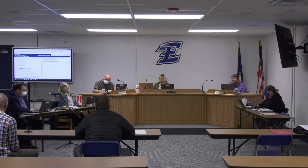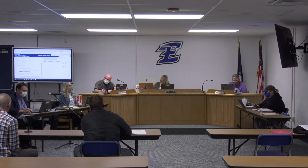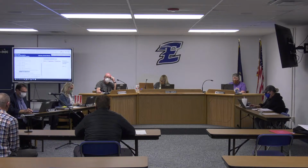Okay, so we're moving along to the high school project, Phase 7 renovation. Yeah, so it's been a big month for that particular project. Currently, the regulatory agencies, the Kentucky Department of Education and Housing, Building, and Construction are reviewing the project. The design team is currently working really hard to provide Codell, the CM, our final print set documents. We're scheduled to do that on the 23rd of this month. And it is my understanding that we're looking towards right around the 1st of the month of April to go out to bid. So we're coming down to the wire on this one. And it's been an honor. It's been a really fun project to help design and to be a part of during these meetings. But I'll be happy to answer any questions that you have.